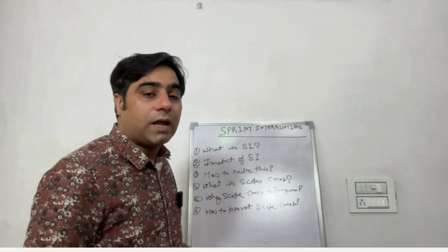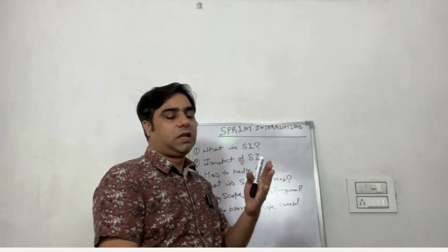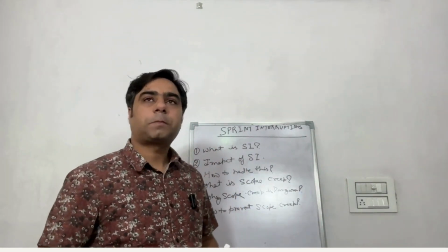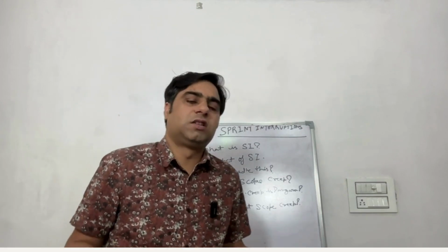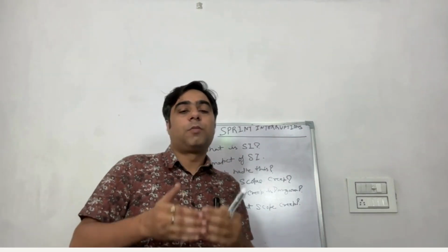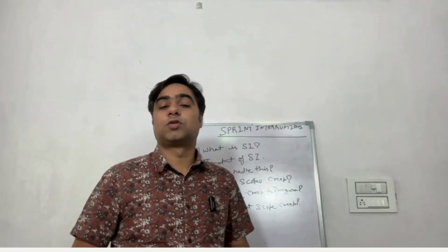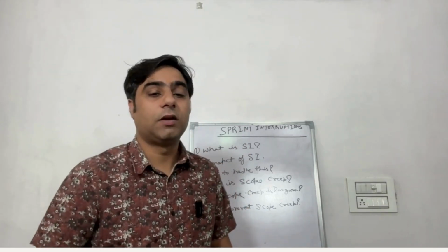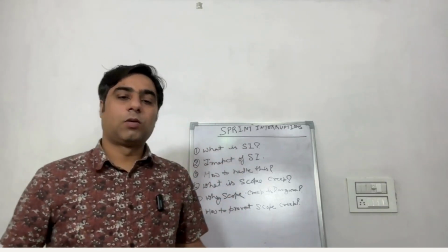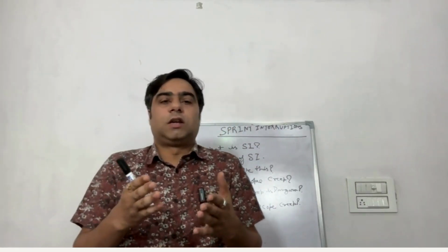Okay. Now next is use the product backlog. Let's suppose you discuss with your stakeholders and you come to the point, okay, this is not urgent, but definitely we can take it in the next sprint. Then put this item in the product backlog so you can take it in the next sprint.